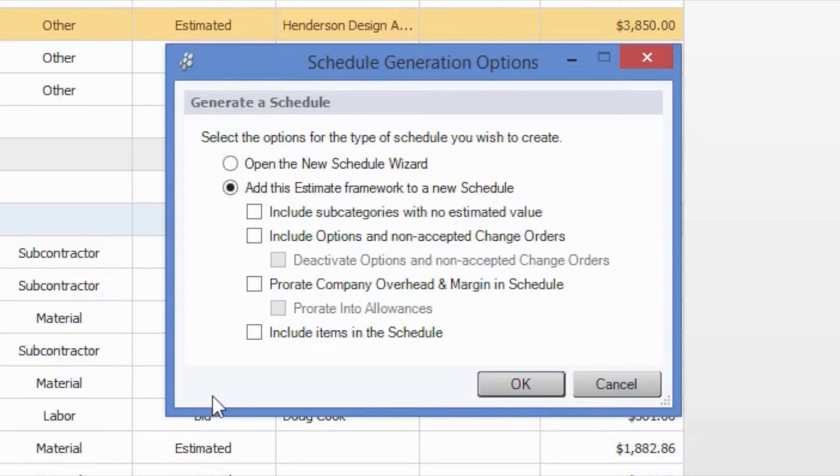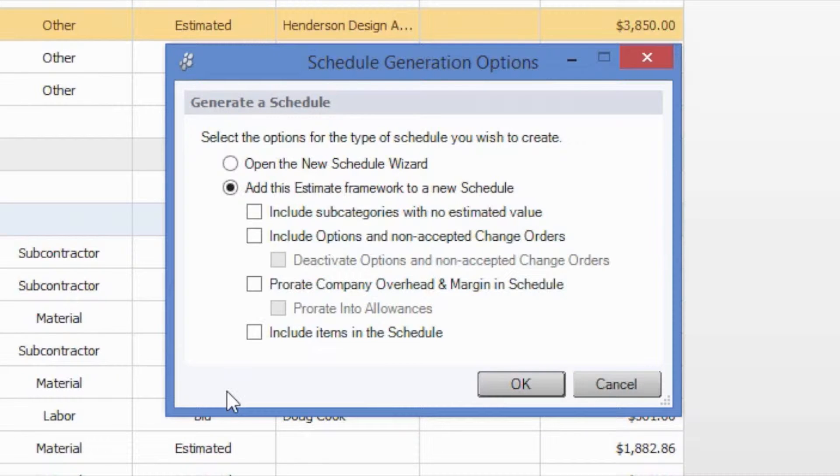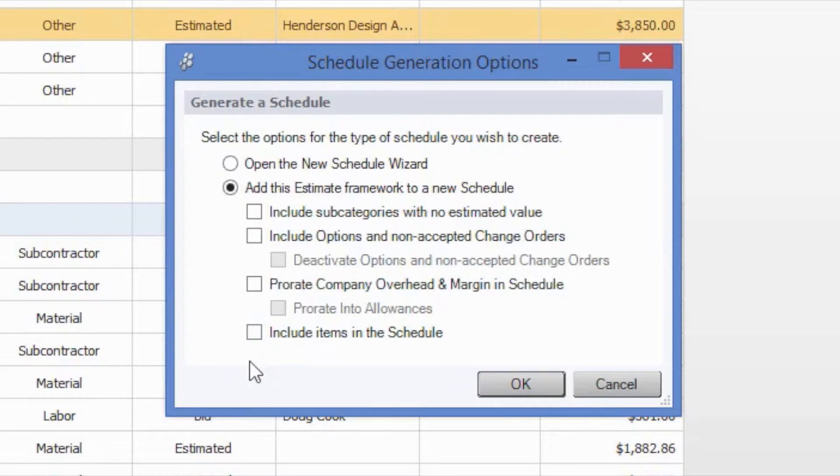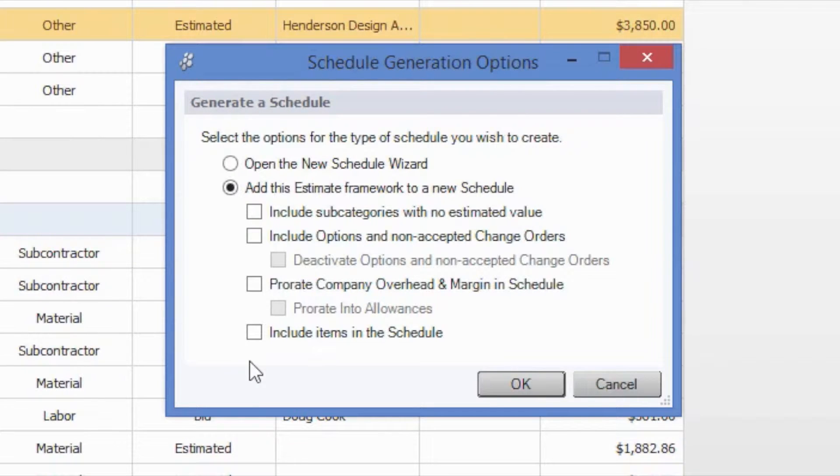Now, if we would like to include our item level of detail in the schedule as tasks, we can certainly do that as well by selecting the Include Items in the Schedule option at the bottom. But depending on how you set up your estimates, you'll likely not be scheduling for things like 2x4s or anchor bolts, so we're going to leave those off this time.